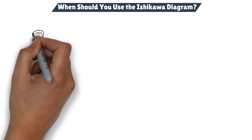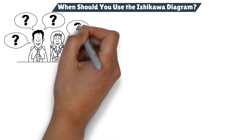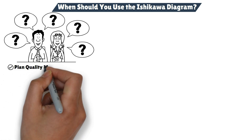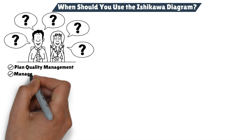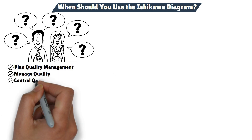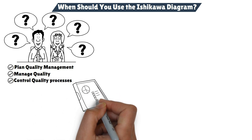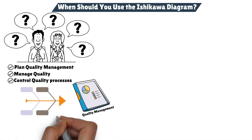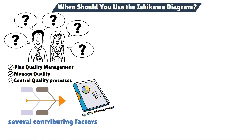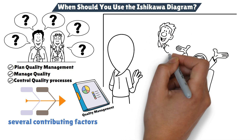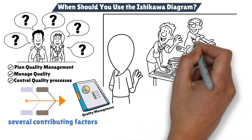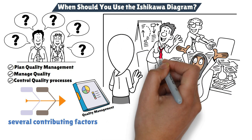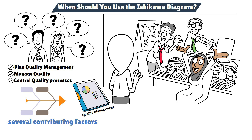You might wonder when this diagram comes into play. In project management, it's commonly used during the plan quality management, manage quality, and control quality processes. These are all part of the project quality management knowledge area, and the Ishikawa diagram is most useful when you're trying to solve complex problems that might have several contributing factors. It's particularly effective during brainstorming sessions, where team members come together to explore all possible causes of an issue.